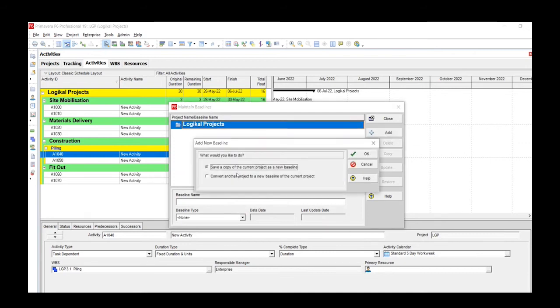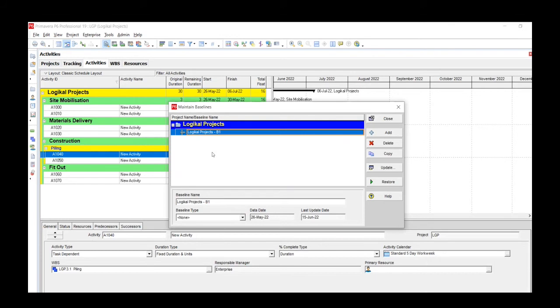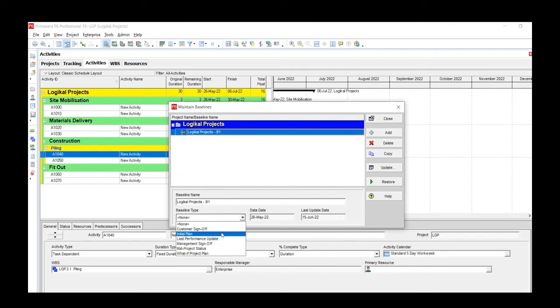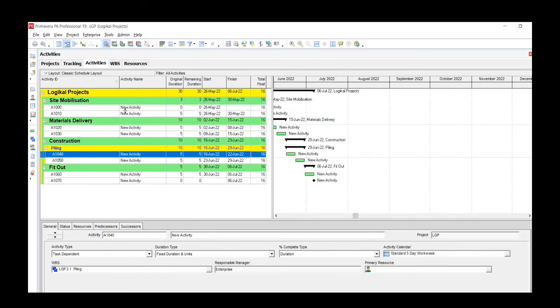There are two options there. We'll choose the option that says 'save a copy of the current project as a new baseline' and click OK. This automatically brings up our initial baseline for this project. We'll go to Baseline Type and we'll choose Initial Plan from the drop down window, and then we click on Close.